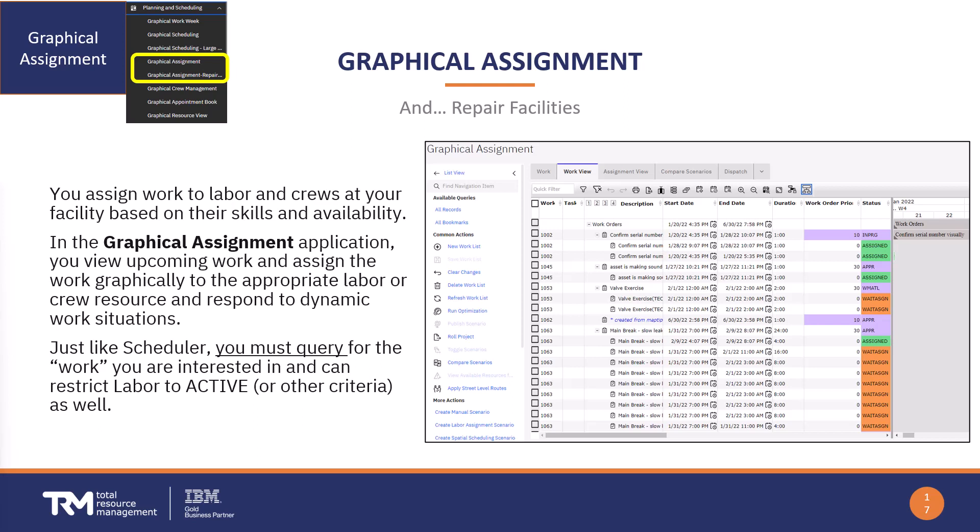You can either create a query just like you do in the scheduler to focus on the work order records and labor records you're interested in, but you're also able to build work lists for the assignment tool from existing schedules. If you have schedules that are out there in the system, you can use them as your source of records to create work lists that are then manipulated within the graphical assignment tool.